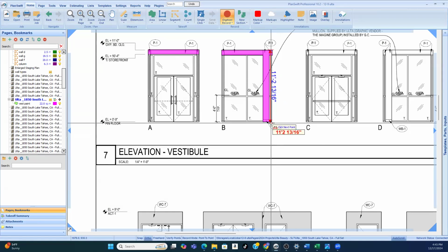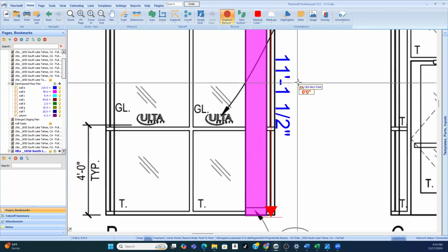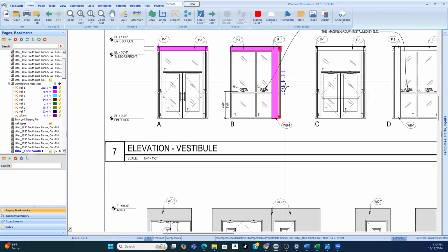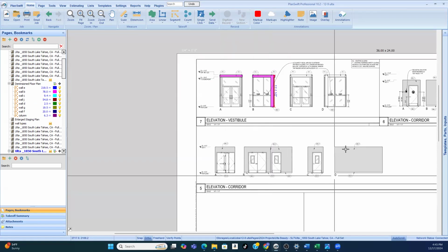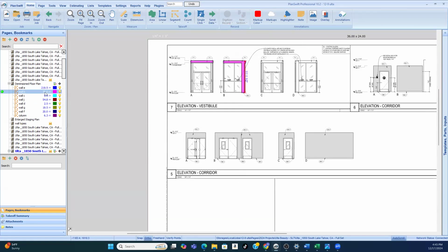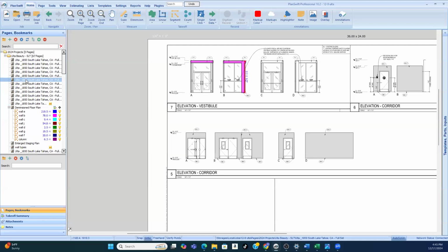So when we make our measurements, we always go up to the nearest even. So I'd say 12, all the exterior walls, I would go 12 feet. I just say 14 because it doesn't show me very well at all. So I would say exterior walls are 14 feet, but let's do it another way.